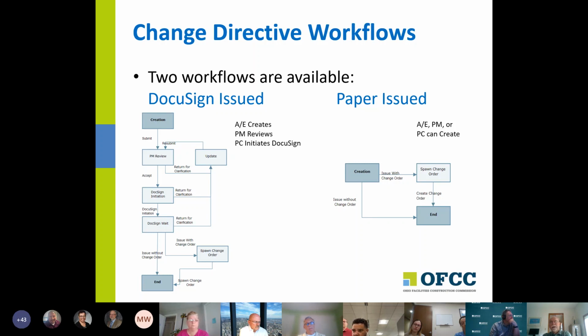The other way a change directive might be created would be to not have everybody there. And we said, well, how's that going to happen? With our current use of DocuSign, we set this up to be a DocuSign workflow. So we end up with the AE actually creating the change directive, today in both the agency and K-12 versions as well. The PM reviews what was created and then sends it to the coordinator, who has the DocuSign license to initiate a DocuSign workflow that gets all the signatures on it.